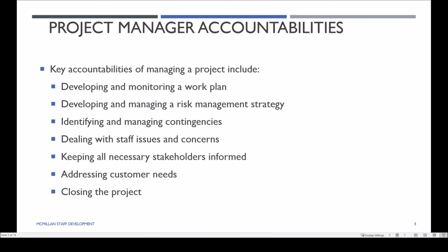And then we undertake a risk management approach or strategy where we think, okay, I've got my fundamental plan down, but what are some of the things that can go wrong? How seriously do I take those things occurring in terms of what are the consequences and what are the likelihoods, making a determination of the level of risk, and then making a determination on the appropriate action to take, or treatment. And that really falls within the planning phase. And then as we go through the execution, we're dealing with those contingencies as things go off the rails or go off the plan, managing those.